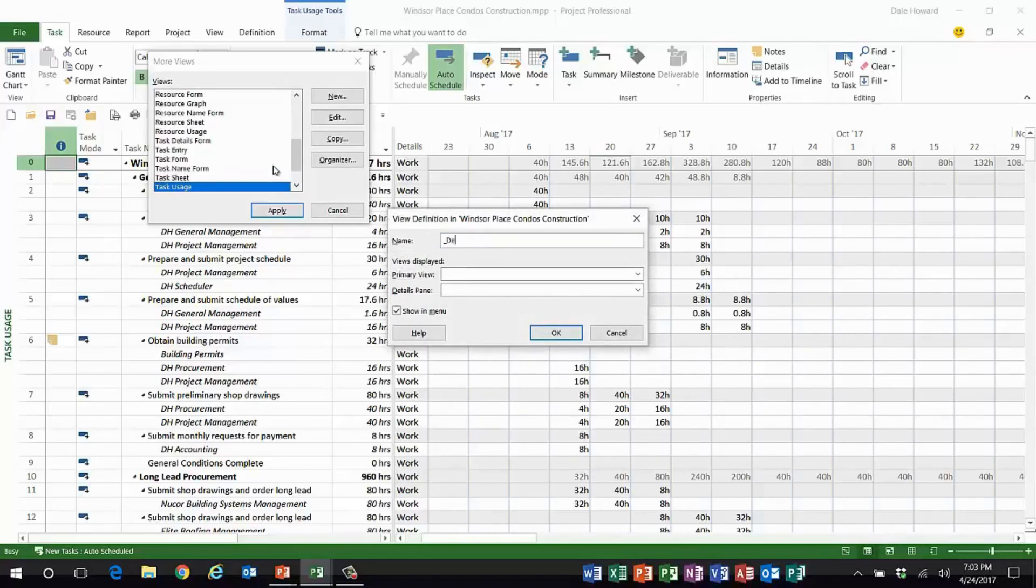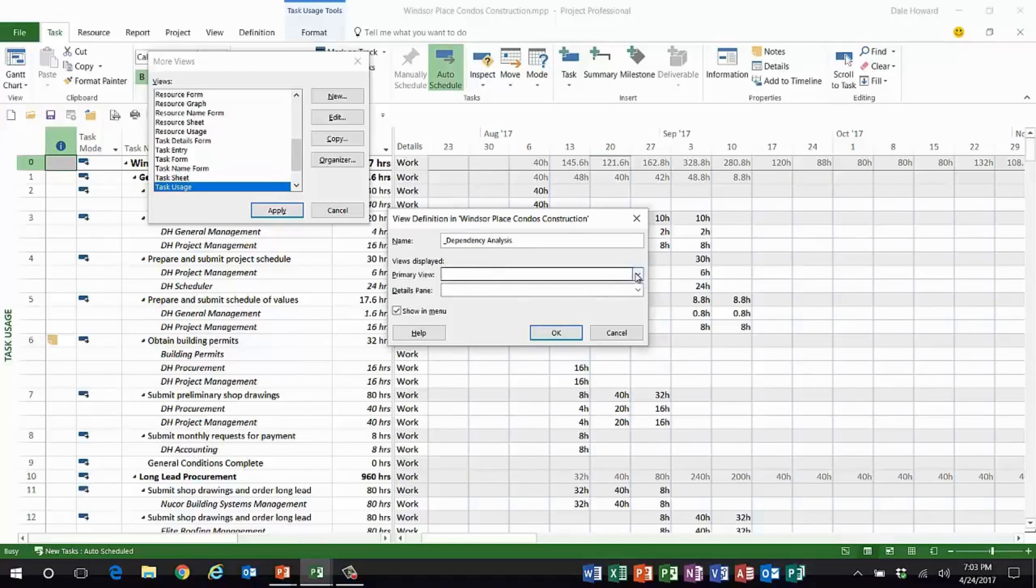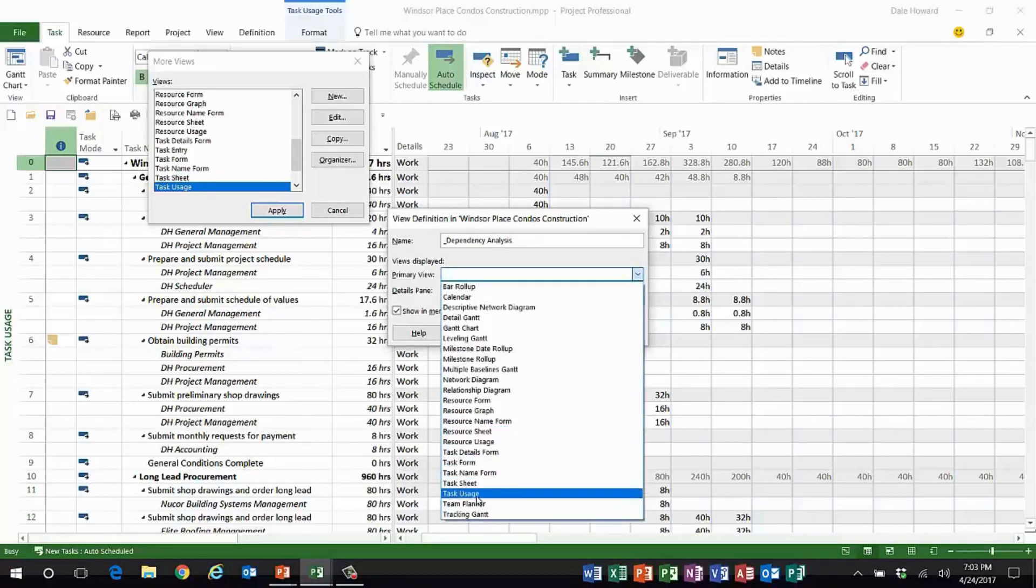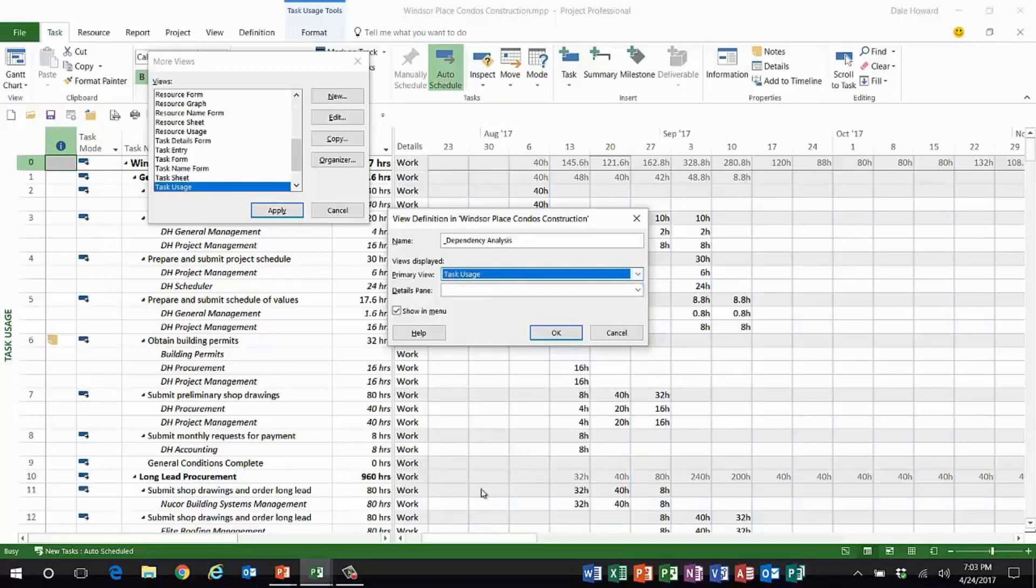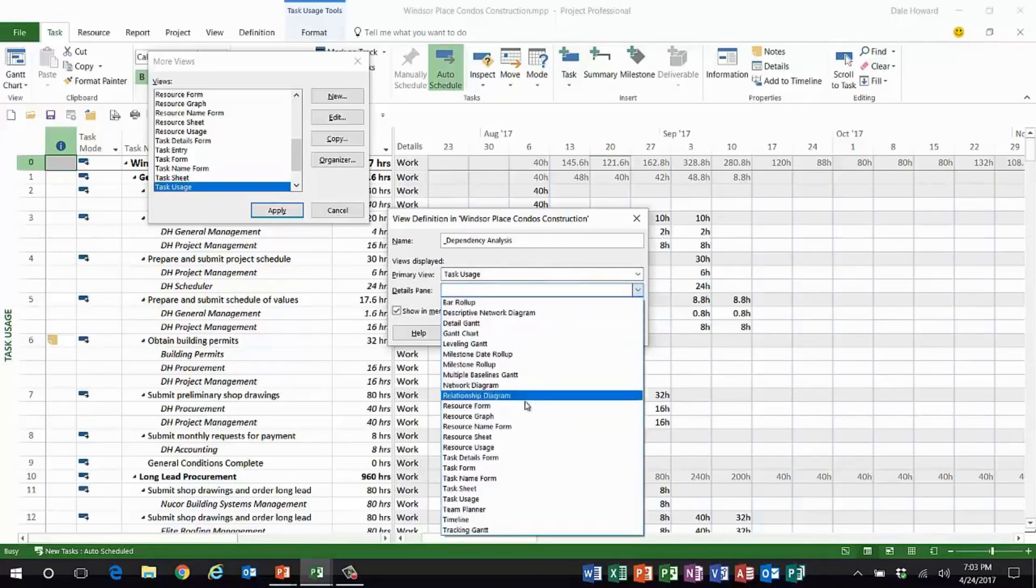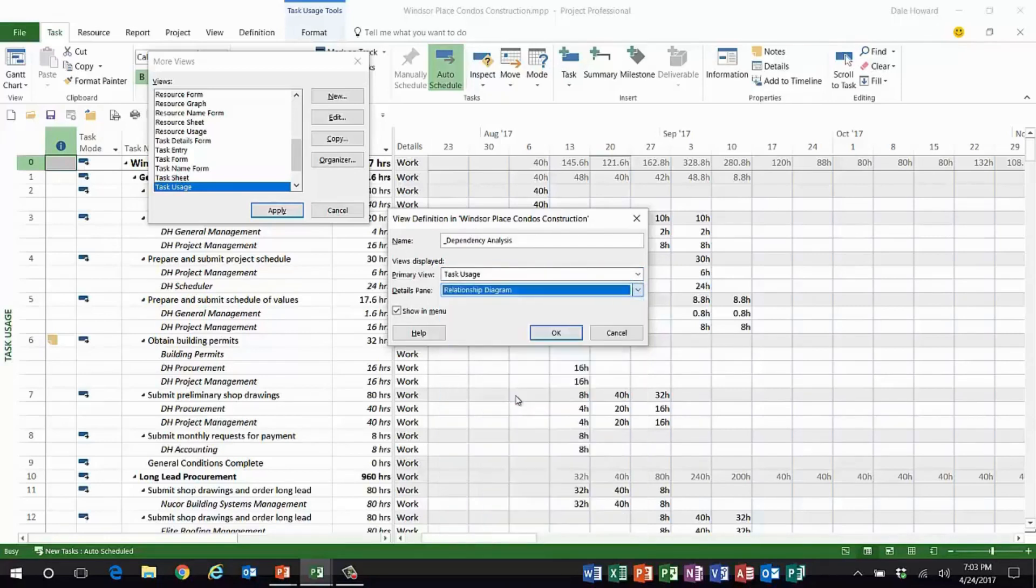It's going to ask me for a name. I'm going to call this dependency analysis. Now I have to pick which view I want in the top pane. Let's use task usage in the top pane and this very special view called relationship diagram in the bottom pane.